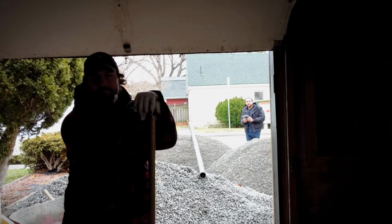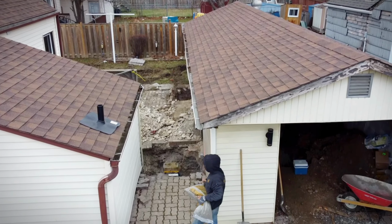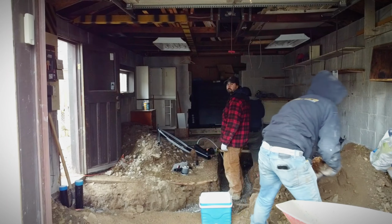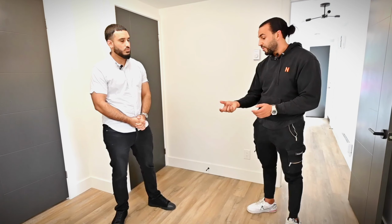Was it a pretty significant cost? Was it repouring a new concrete slab, because now you have to do prep work, and now that's considered a new slab, which means you have to insulate under it, you have to put the granular under that. So there's a different building code that applies, I guess. It's almost like you're building a new build, right? If there was an existing slab and the slab's in decent shape, you put some insulation on top of it for the garden suite specifically, and then you go with subfloors. But because the slab was in rough shape, they wanted a new slab, just like you would put in for a new house. So it's got to have a solid foundation or sub base under it. Yeah. So you put your granular, you compact it, you put your insulation, and then after that you put your vapor barrier and your rebar, and then you pour. So it's a real slab. It sets you back, depending on the size of the garage, $9,000 to $11,000.